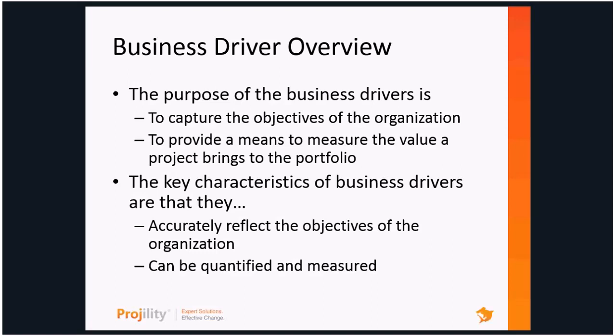So if we're going to start mapping our potential projects to business drivers, we want to make darn sure that those business drivers really do have an impact on the organization, and those projects are going to give us real business value. Importantly, as mentioned before, they have to be able to be quantified and measured to be meaningful. If we can't measure them, then we really can't score our projects against them. So business drivers and having them and coming up with agreement on them can take some time, but if you get to the point where you've got these and you can review those on a regular basis, it becomes much, much more useful. So planning gets a lot easier.